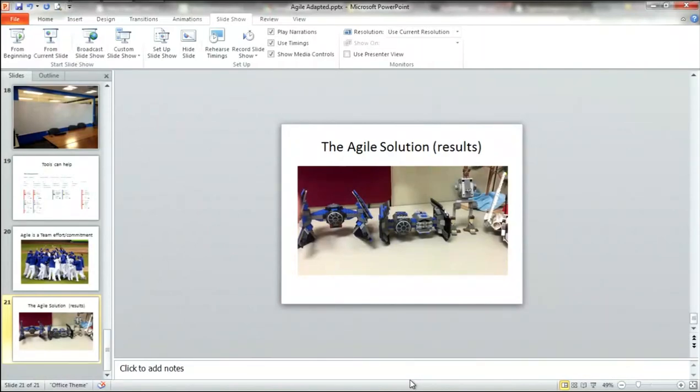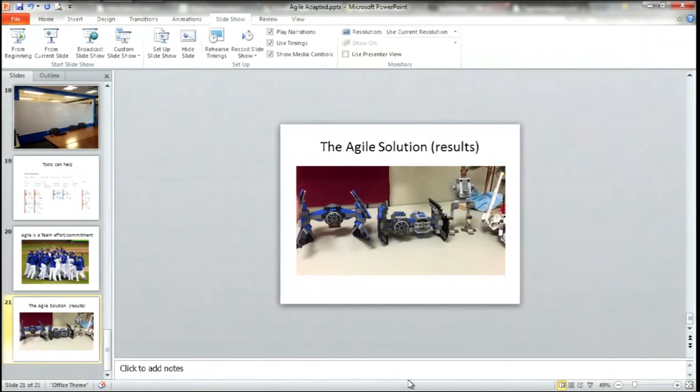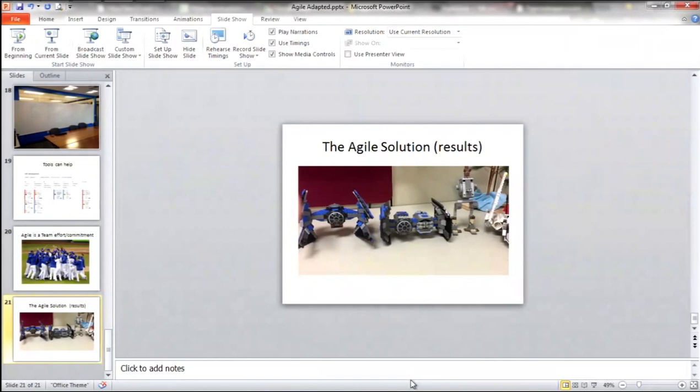Agile is most effective with smaller teams. What's your team size? 4 to 5? No more than 8. Testers and developers and analysts. Actually, nationwide they go up to like 20 and 22 for a particular project, but that team is working on just one project and they're trying to get something out.